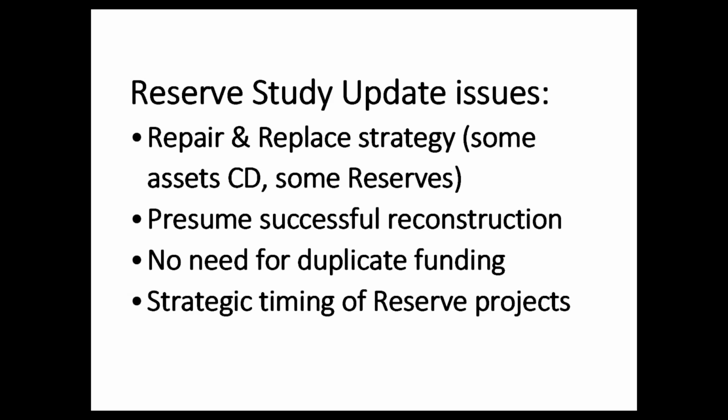Hopefully your reserve specialist is working with the construction defect team to understand what projects are going to get done with reconstruction funds, because as a wise board member, you don't want to be collecting funds for reserves to replace the asphalt if indeed the asphalt in a year or two is going to get totally rebuilt with reconstruction funds. So you want the timing to work. You don't want to do duplicate funding.